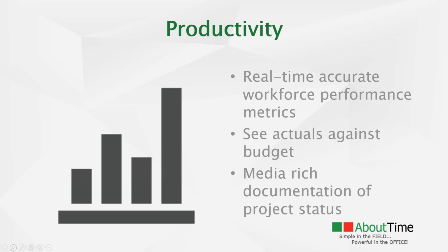So next year you get a similar job location and a similar set of tasks. You can look back and say, oh yeah, we know that when we estimated that task to take 100 hours, it took 80 hours. We need to get competitive. We can trim that estimate down to 80 or 85 hours. Leave a little bit of fluff in it, but you have that ability now.